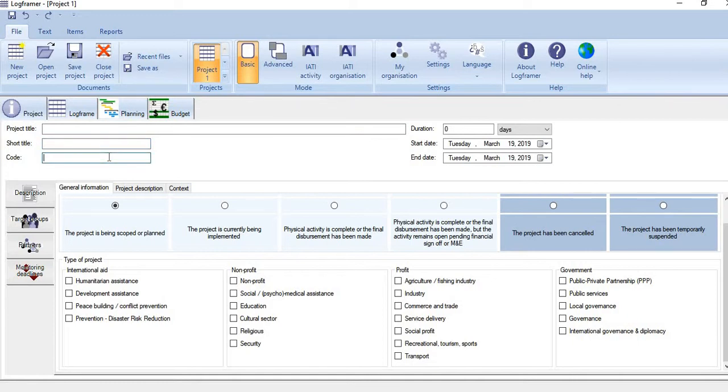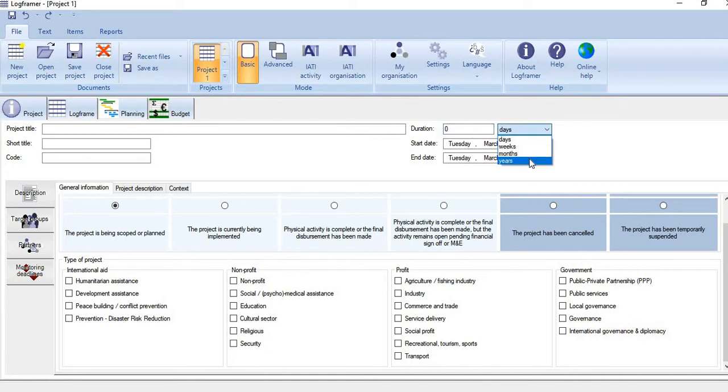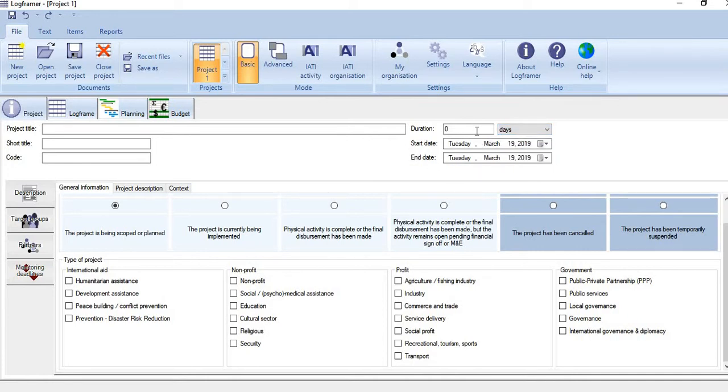You can give some code also, and the duration of the project is specified here. You can specify duration in days, weeks, months, or years. Once you give a start date and specify duration, the end date is automatically calculated by the software.